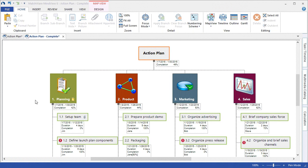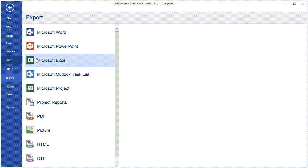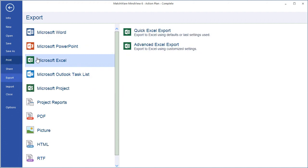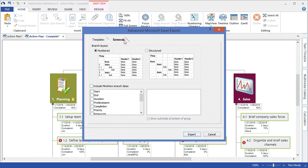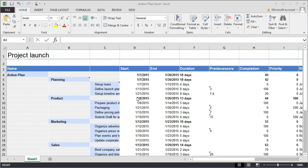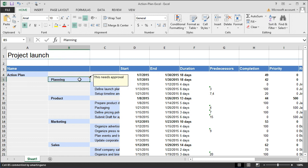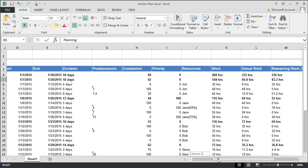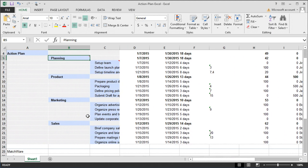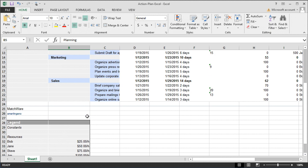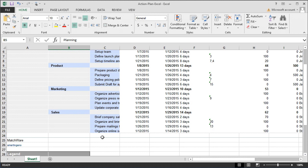By exporting to Microsoft Excel, you can have each individual branch listed as a row with the corresponding task information listed as the column heading and the task data listed in that specific cell. I choose my desired template, determine what elements I'd like included within that export to Microsoft Excel, and then choose Export. The Export to Microsoft Excel supplies all the task and project information with the corresponding topic descriptions that were included, task information, summarization between deliverables and tasks, and if you choose to include the legend, you can even include all corresponding resource costs that are used within the project plan.